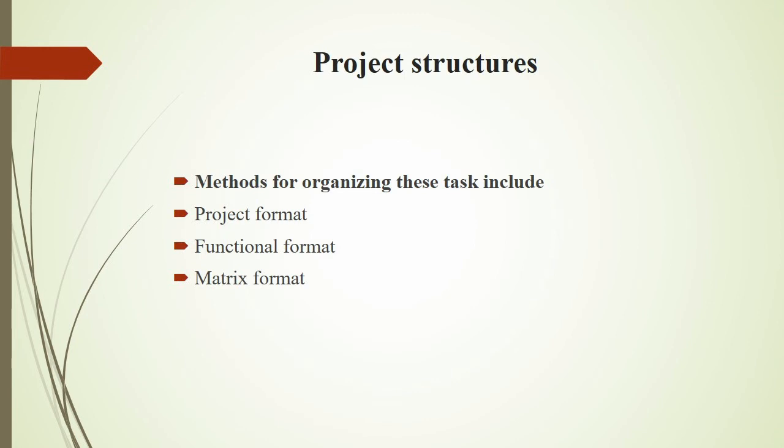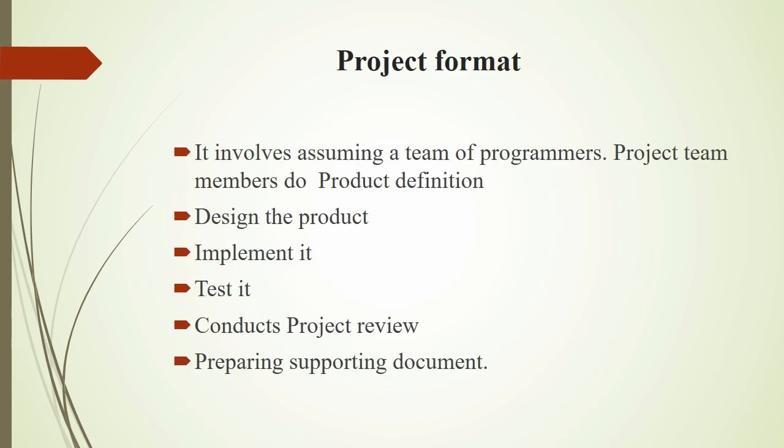The next topic is project structures. The methods for organizing these tasks include project format, functional format, and matrix format. Project format. It involves assigning a team of programmers. Project team members do product definition, design the product, implement it, test it, conduct project review, and prepare supporting documents.